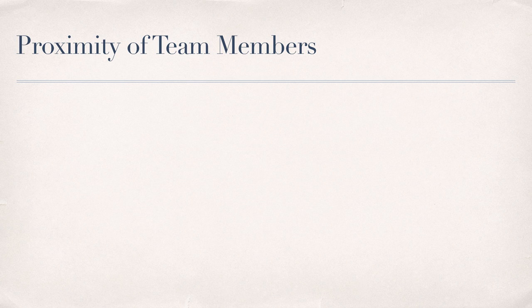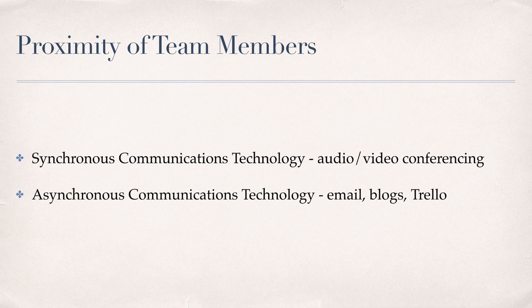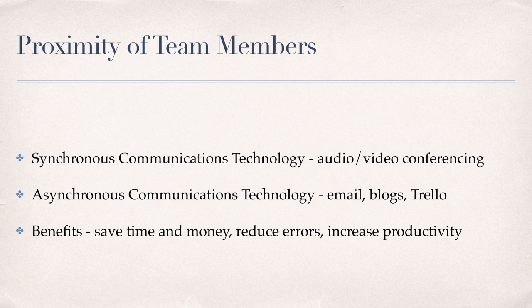What is the proximity of the team members to one another? What are the team norms and values related to synchronous and asynchronous technologies, including social media? Synchronous communications take place when all parties are present at the same time — examples are audio and video conferencing. Asynchronous communications take place when parties are not present at the same time — examples are email and blogs. You need to determine if a new technology can save time, reduce costs, or prevent mistakes, and if the increased complexity can be handled by the team to ensure benefits outweigh the cost.